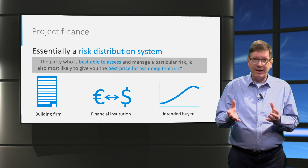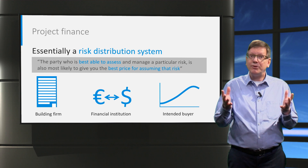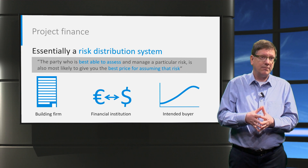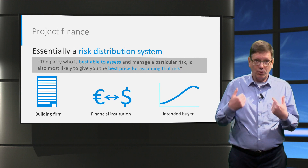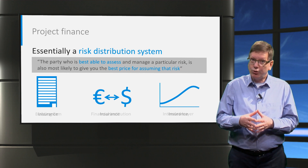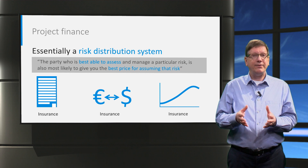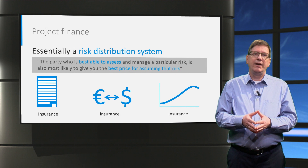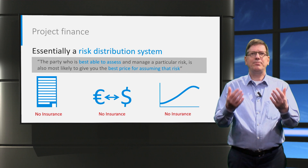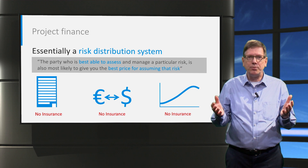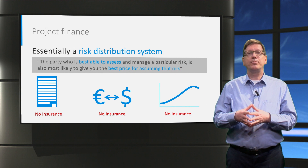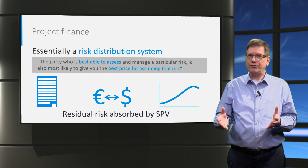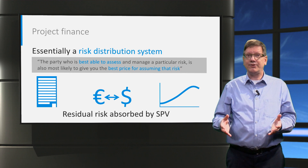The party who is best able to assess and manage a particular risk is also most likely to give you the best price for assuming that risk, because all risk transfers will cost the SPV money. If we can't find a contract party willing to assume a certain risk, we can try to insure that risk with an insurance company — for example, for the risk of an earthquake occurring. If insuring a risk turns out not to be possible, the SPV will be left with that risk, and we can only hope that such a residual risk does not block the project financing. If it does, a project may not be independently financeable unless we can get financial support, for example from a government or an international agency.